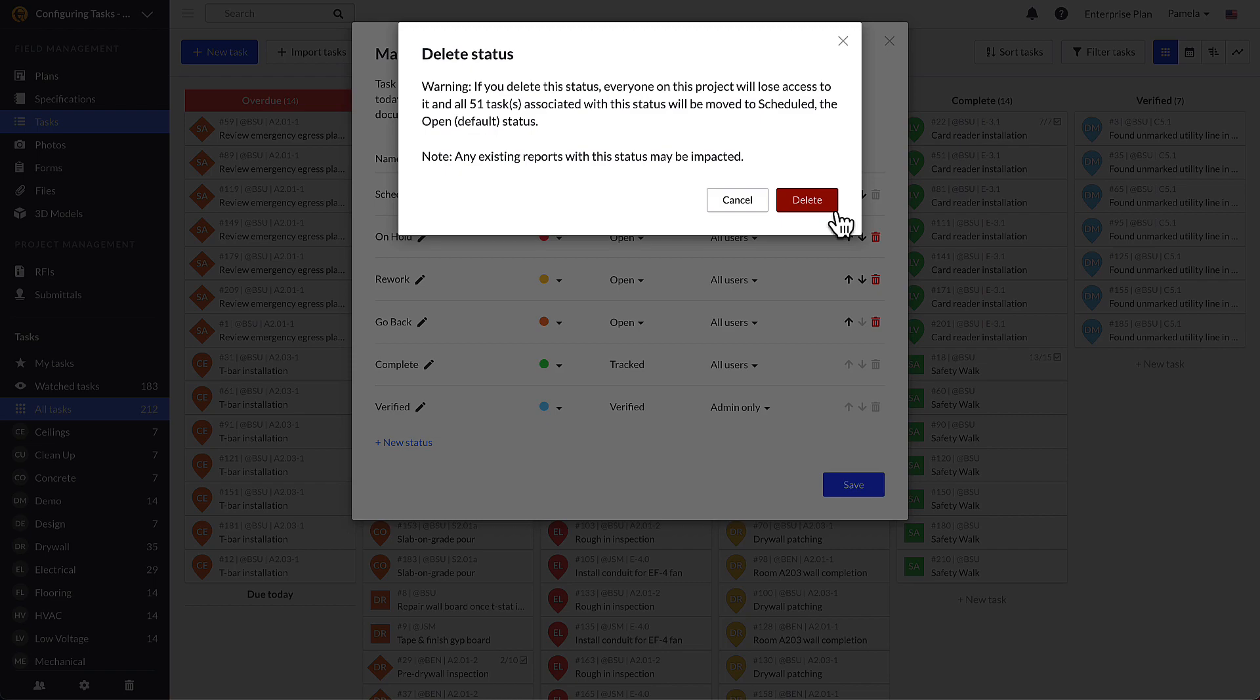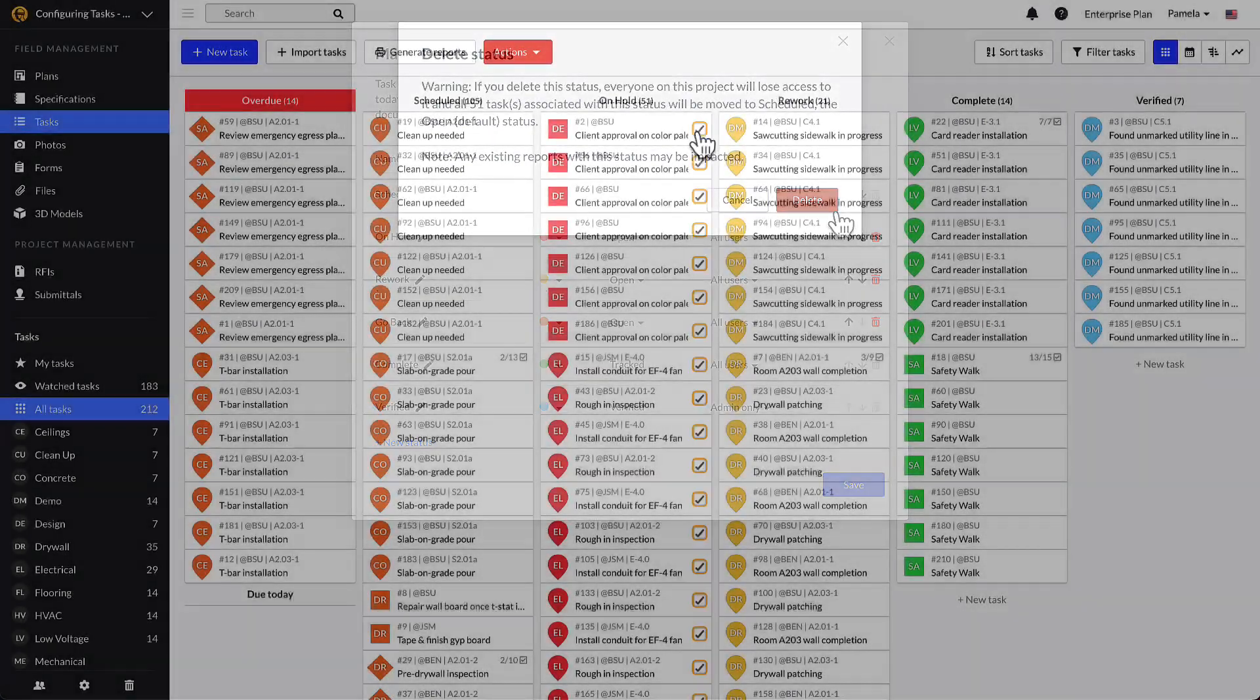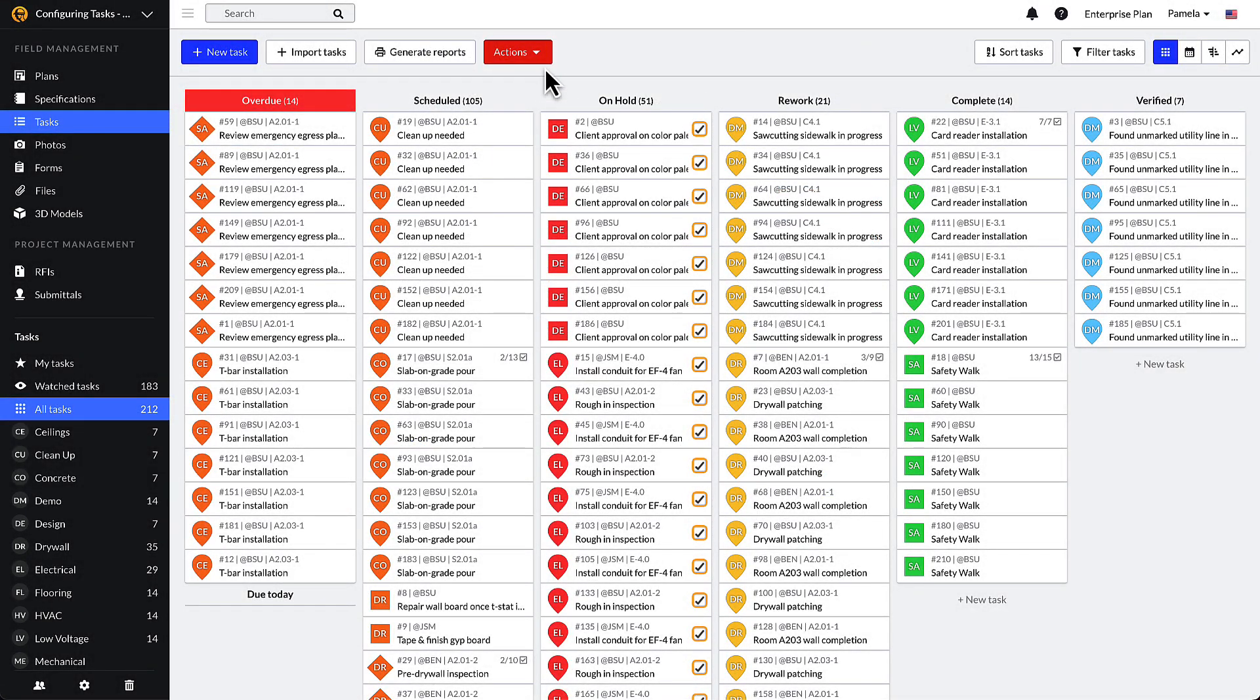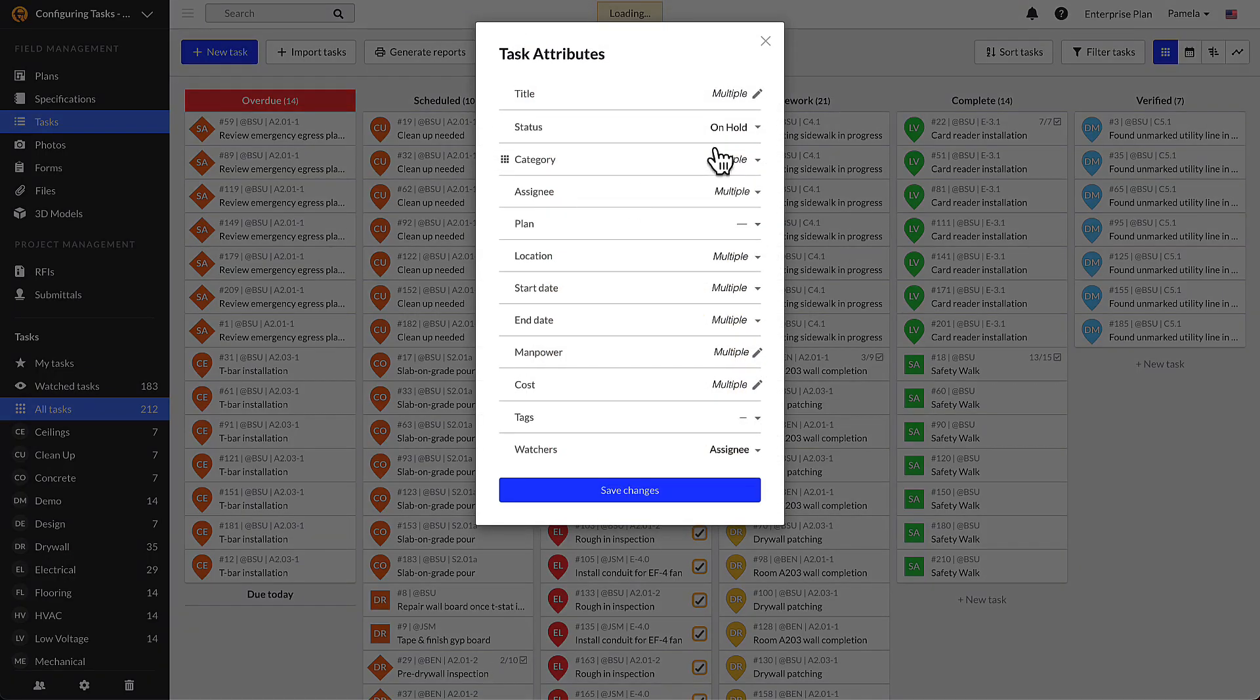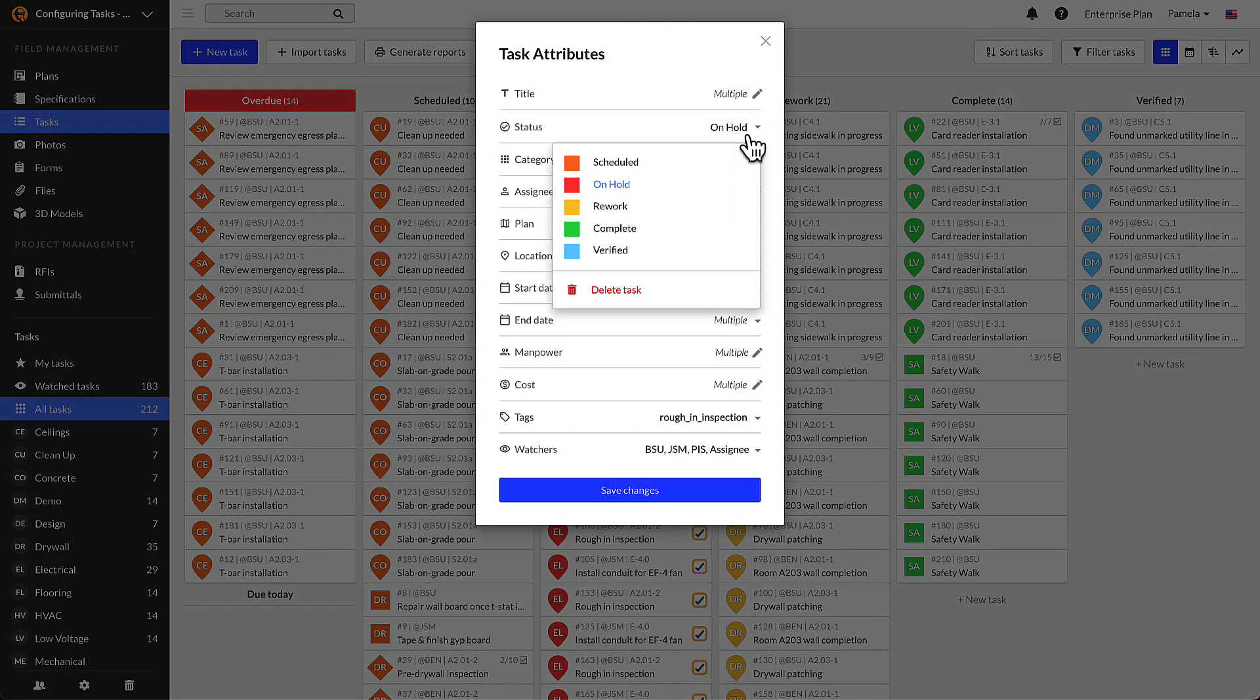When deleting a task status, all tasks within it will automatically move to the default status. Therefore, we recommend that you batch edit tasks within the status you're deleting into a preferred status prior to deletion.